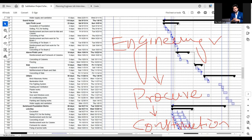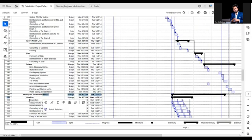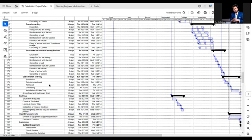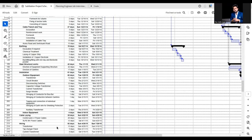Here we can see switch yard foundation works — line bay and transformer bay. In line bay: excavation. Transformer bay works are there, structures for overhead strung bus bars, and cable trench and tray excavation. After civil works, steel structural works installation begins. Now installation work has started: outdoor equipment — transformer, circuit breaker, disconnecting switches, capacitor, voltage transformer, current transformer, surge arrestor, stringing of conductor for bus bar, stringing of conductor between gantries, taping and connection of individual equipment, stringing of earth wire for shielding, auxiliary transformer, indoor equipment, cable laying, and wiring.